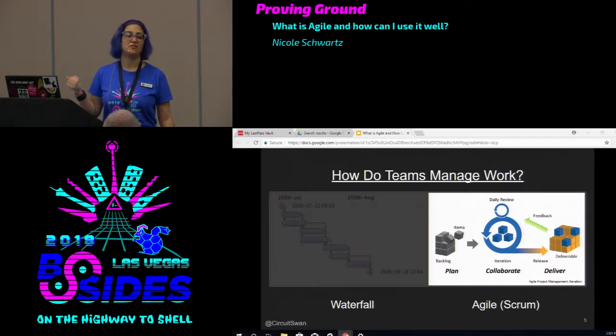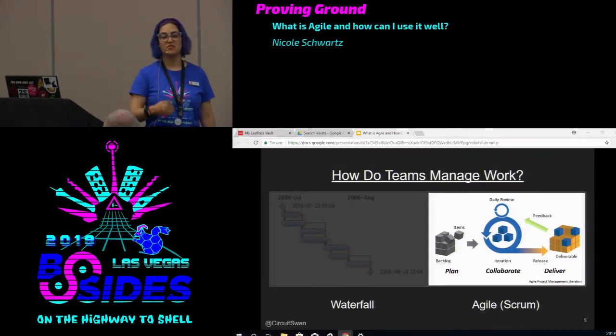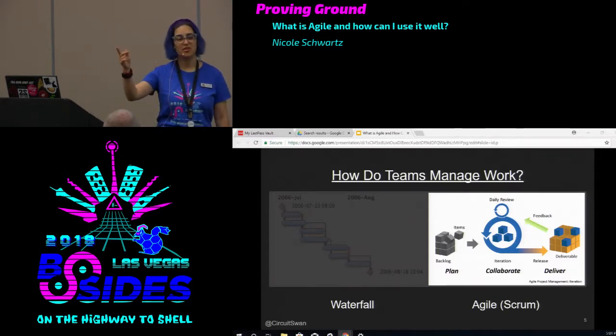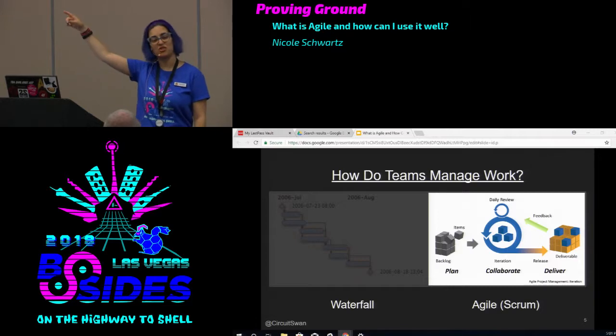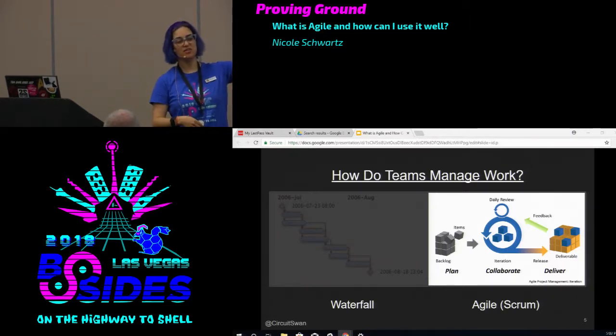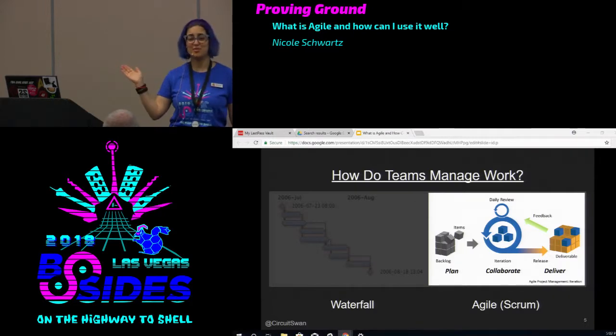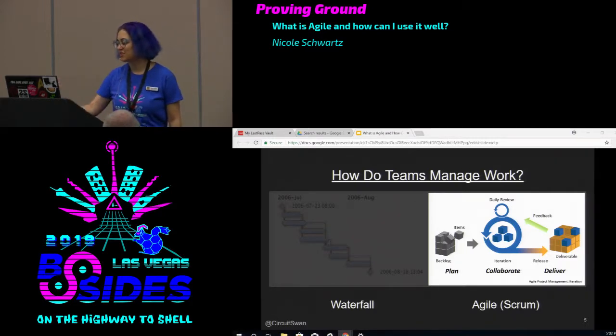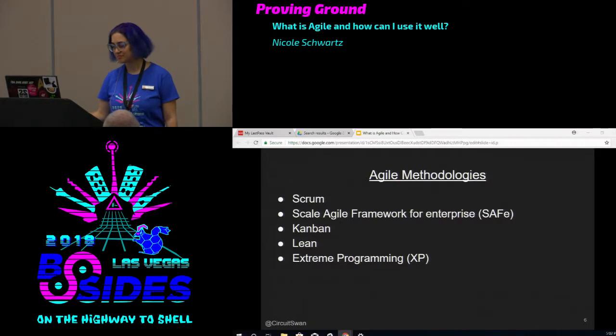The idea is that you're going to fail fast. So if you release something and everybody gives you feedback, this sucks, you don't bother to go on to the next feature. You either improve it or maybe you throw out that whole feature chain. For those of you who are gamers, you know how there are chains of things that connect? Well, a lot of times program managers have this feature with all these other follow-up features. If nobody likes them, don't do them. It's a waste of money. So this is potentially saving you a lot of money.